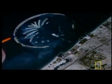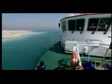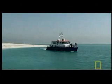The decision to start construction before completing the research has finally caught up with them. Coming in or going out. The sea isn't circulating around this massive megastructure as they planned. Tides aren't flushing the system properly, and clean water isn't moving fast enough around the inner waterway. The water is in serious danger of becoming stagnant.